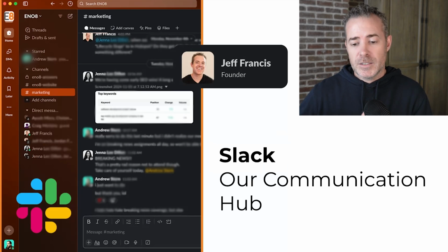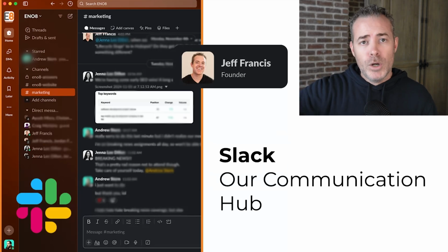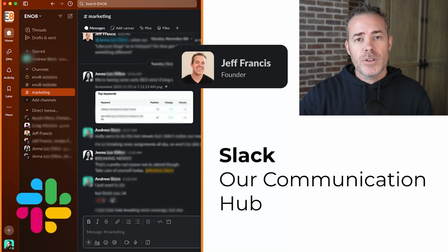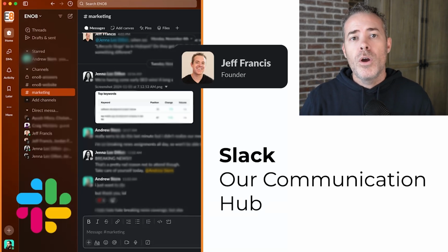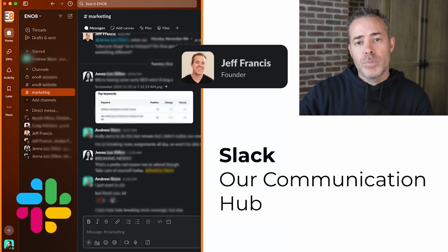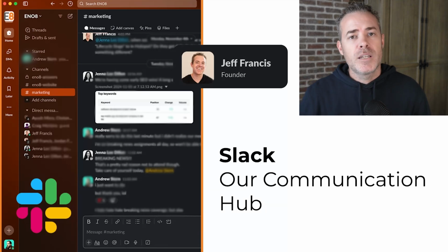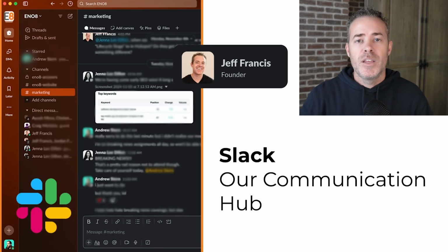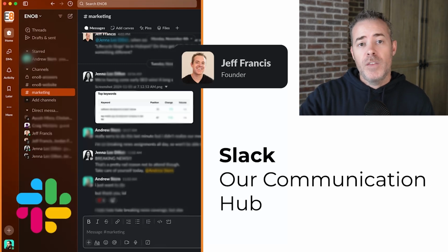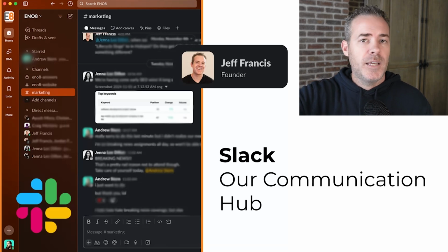And I find that kind of stuff, especially when you have a remote team that's working very asynchronously a lot of times, those notifications at the right time, as long as they're not overloading you, really help close the gap between something happening and somebody taking the next step. That's one of the biggest killers in project timelines, is just that gap between a dependency getting completed and the next person picking up the baton and taking the next step.